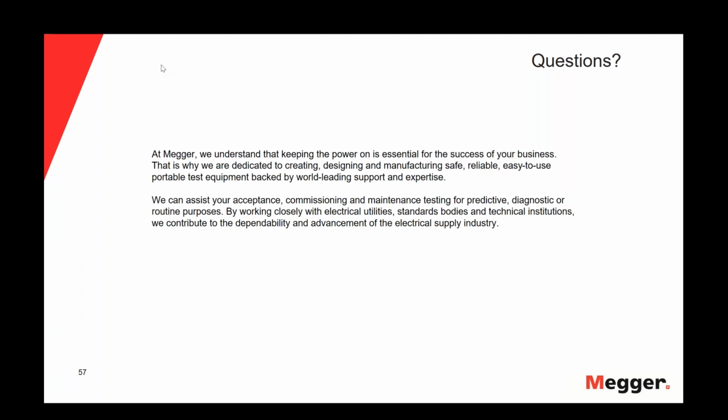And now it starts to become evident that more and more amendments at first are made before the big revisions of the standards are published, to allow for this monitored withstand. So VLF at 3U0 or some other test value at reduced testing time if you do PD.